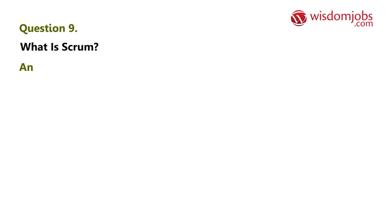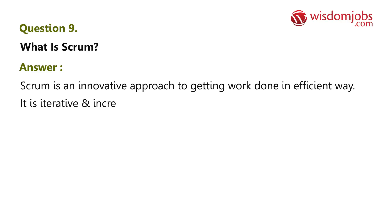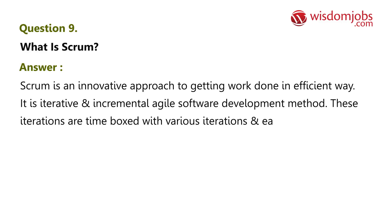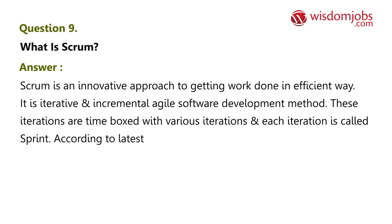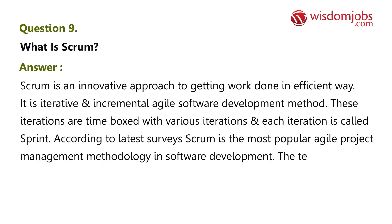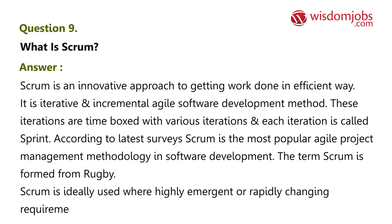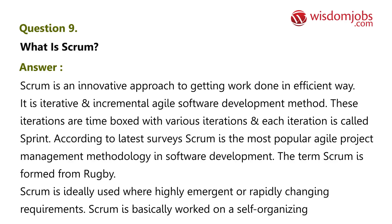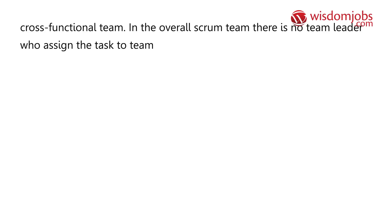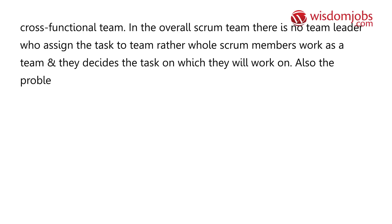Question 9: What is Scrum? Answer: Scrum is an innovative approach to getting work done in an efficient way. It is an iterative and incremental agile software development method where iterations are time-boxed, and each iteration is called a sprint. According to latest surveys, Scrum is the most popular agile project management methodology in software development. The term scrum is formed from rugby. Scrum is ideally used where highly emergent or rapidly changing requirements exist. Scrum works on a self-organizing, cross-functional team where no team leader assigns tasks — members work as a team, decide tasks themselves, and resolve problems together.